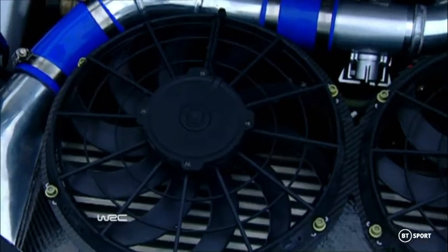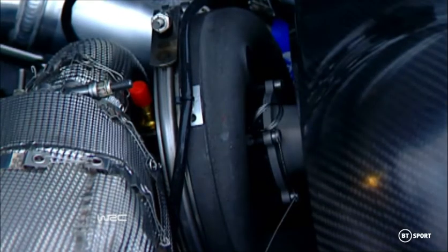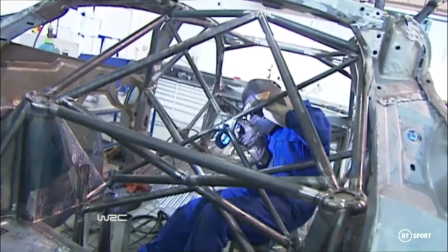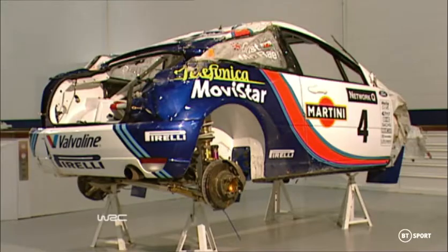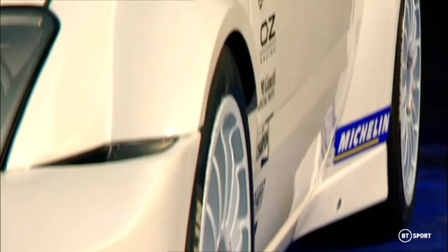We start working on the engine on its own. The transmission guys work on the transmission for the layout and so on. In parallel, we will work on the body shell, for all the roll cage design and stiffness and crashworthiness. And then in parallel with that, we will work on wind tunnel exercises as well. All the program runs in parallel, and at the end all goes together.